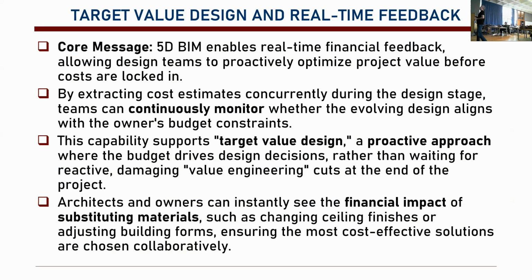And again, target value design and real-time feedback. This is quite good. 5D allows us to give real-time feedback on finances. So this can start at the very early stages. Like you can say, well, I'm going to build this for a certain budget. And then you can say, well, I'm going to build it in steel. Then it can give you a rough estimate. Then you say, well, I'm going to build it in reinforced concrete, but with all glass, then it will give you another price. So basically, if you make changes, it can automatically tell you the final cost.